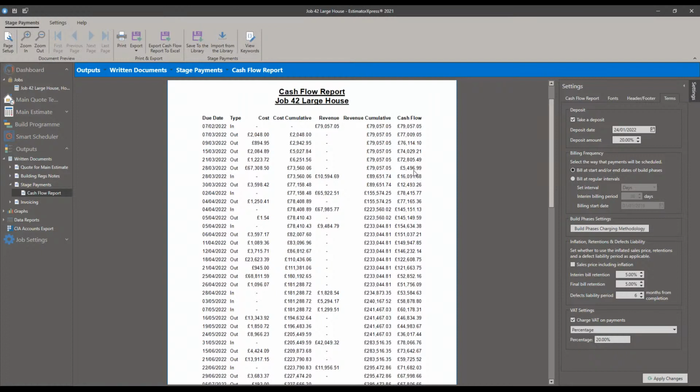So using this cash flow and the terms you've agreed with the customer, we know we've got enough money to continue the job from that point onwards. I've got another 10 grand coming in at the end of March, which keeps us afloat, then 16, 12, and a little while after that, another 65 or 66 based on the phases completed.